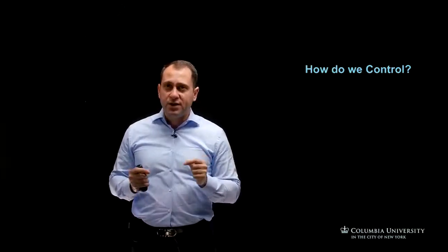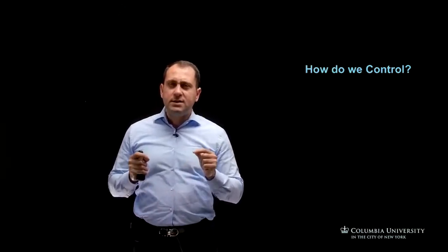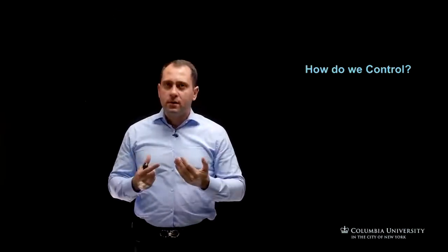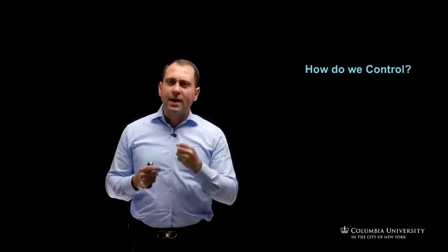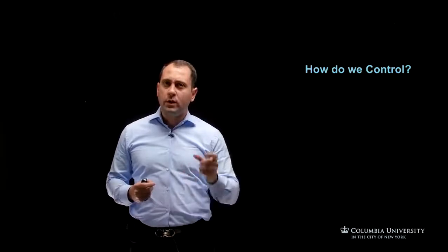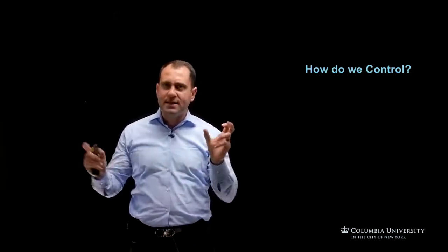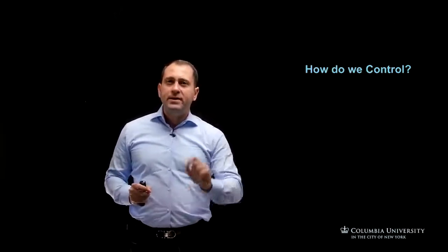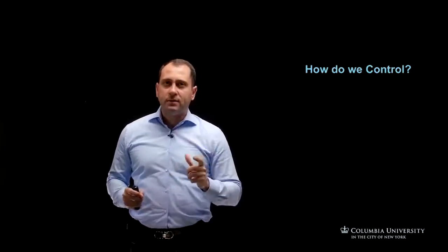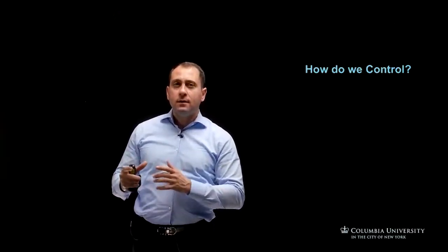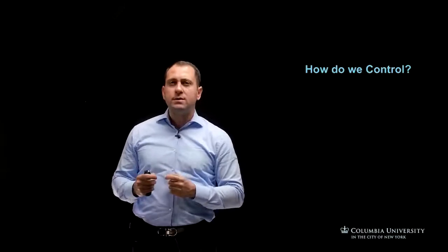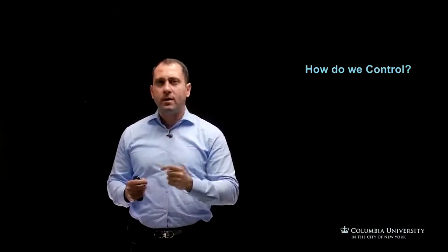When we speak about deviations that are larger than a predetermined value, they are then used to trigger corrective action. And that's what we talked about, measurements and actions. Based on the philosophy of management by exception, actual deviations from plans alert management to focus on a particular problem that needs attention.